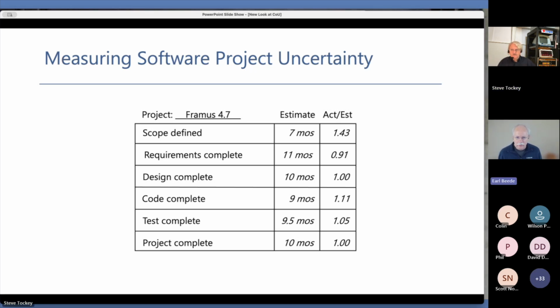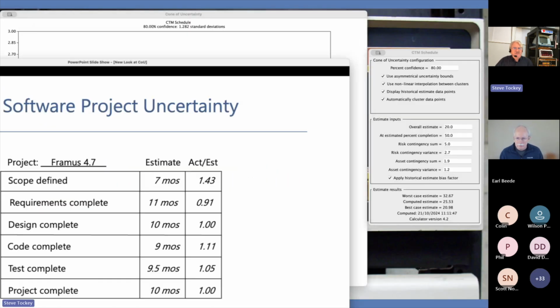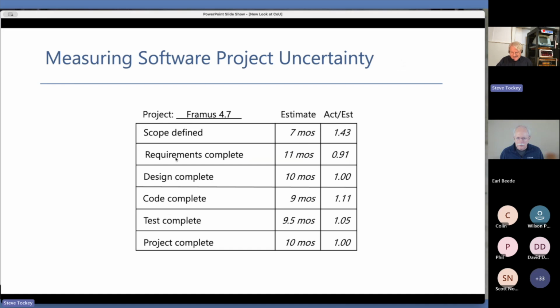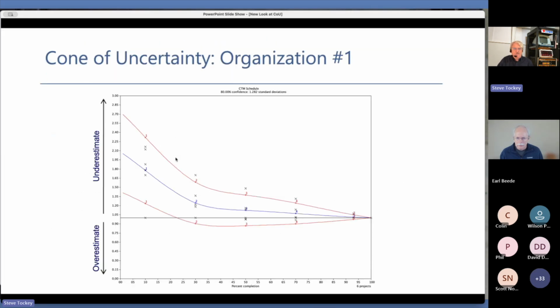For those organizations that aren't being allowed to give a range, first of all, bad on them, but they're not giving a range. Could you say, given that you put in 80% confidence in your tool, instead of saying my 80% confidence is this range, could you say I'm 80% confident on or before, and just use the top end of the range? Right. Yeah. Okay. And so that again points out this difference between the estimate and the commitment.